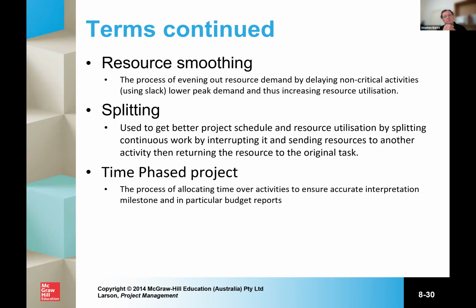You may want to split activities to get better schedule and resource utilization by splitting continuous work and reallocating resources to other activities. But of course, there could be a downside in terms of close down and start up of these activities, or even just the time constraints of moving staff around, or the lack of productivity from moving people around.